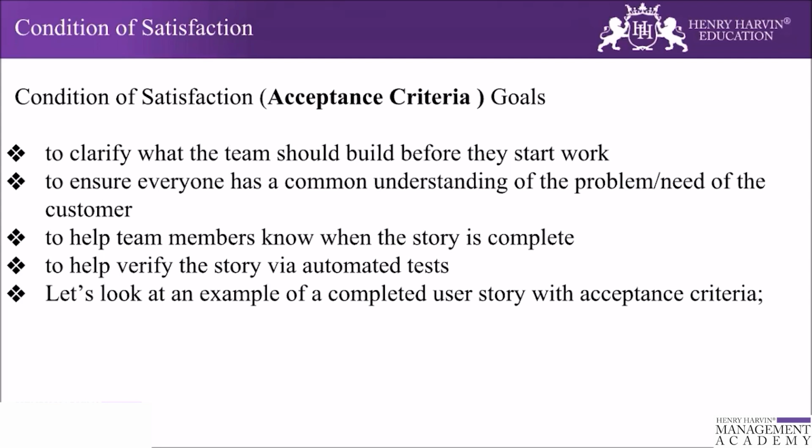There is one question that generally comes up: why can't we just write tasks as user stories? We have seen the hierarchical discussion that there is epic, there are features, there are user stories, and then there are tasks. It's a good question, though most teams asking this question usually don't understand the value of writing the user story, and the fact that they serve a very different purpose to the feature. So if you are writing a user story, the user story is the what part, and the task is the how part.